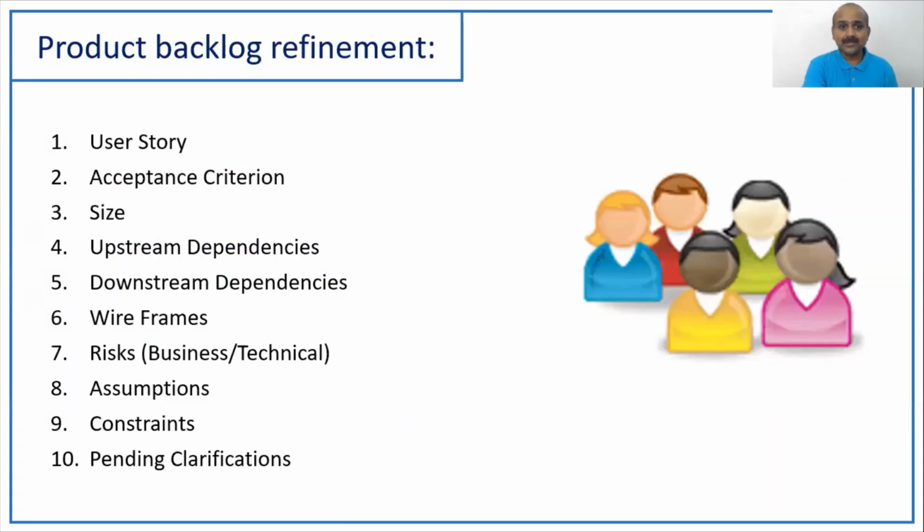So far, we have discussed the do's of the product backlog grooming session. The product backlog refinement session happens in the middle of the sprint or at separate intervals. The whole duration should not cross 10% of the team's capacity. Usually, people may take 3 to 4 hours in a 2-week sprint with a 6-member team, but it's up to the team. The whole norm is that it should not cross more than 10% of the team capacity.